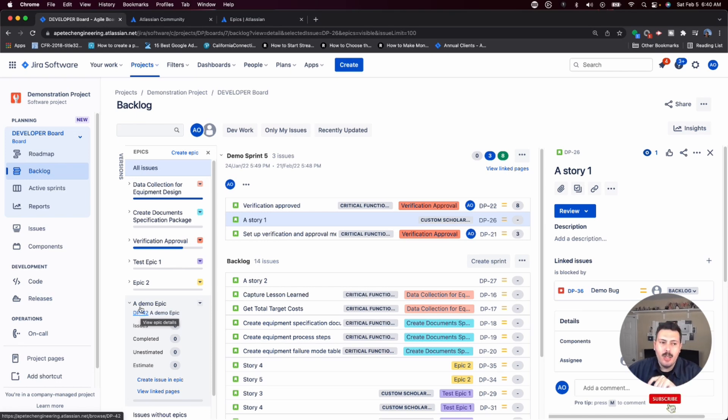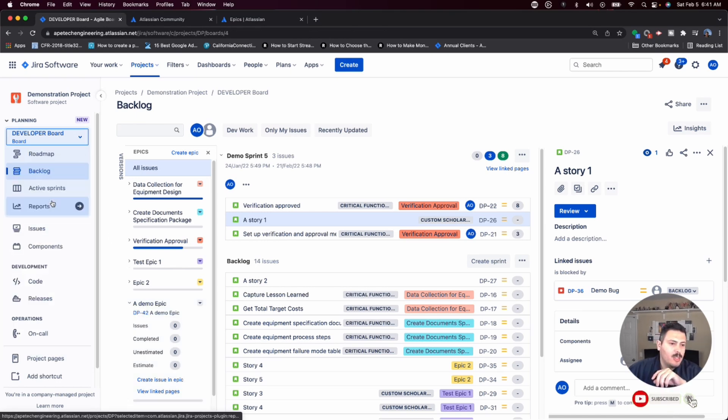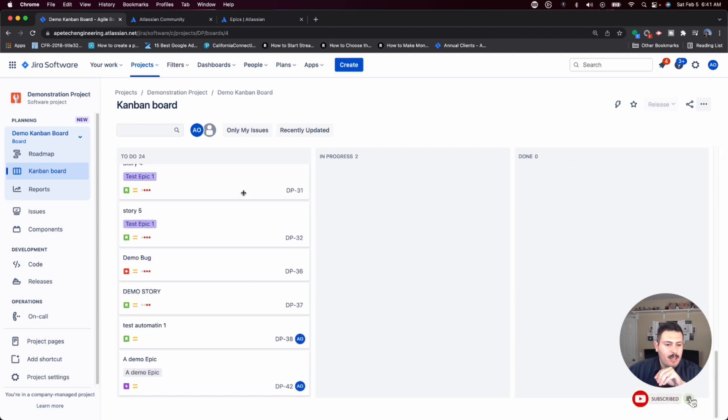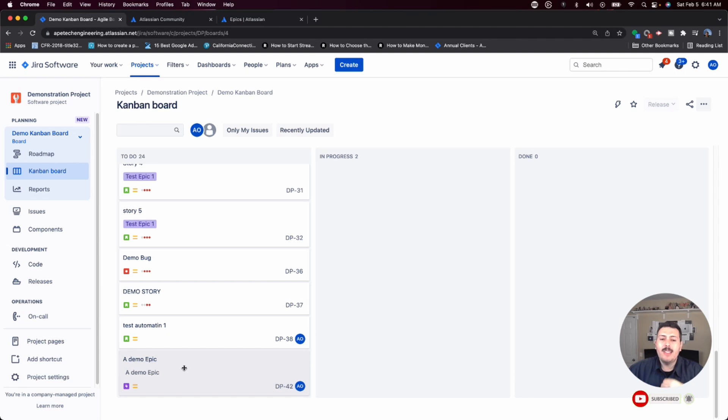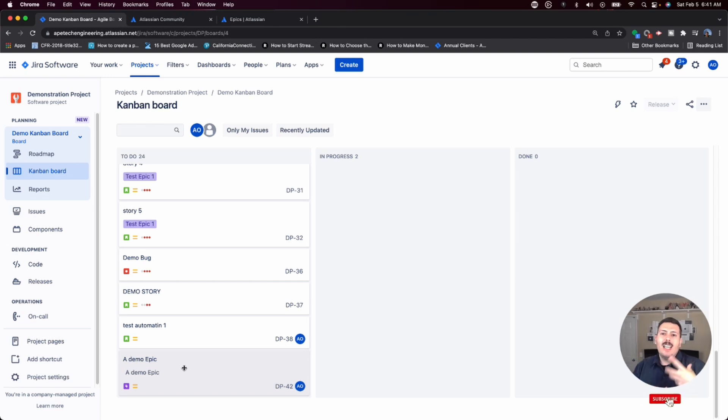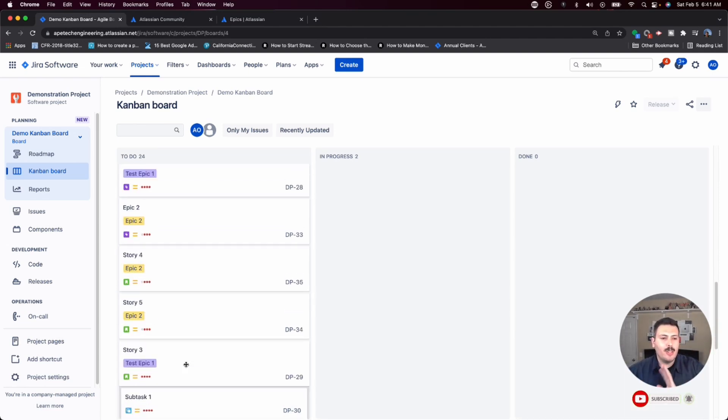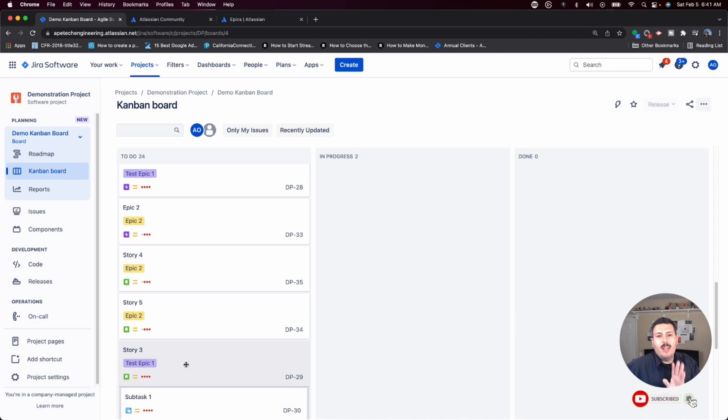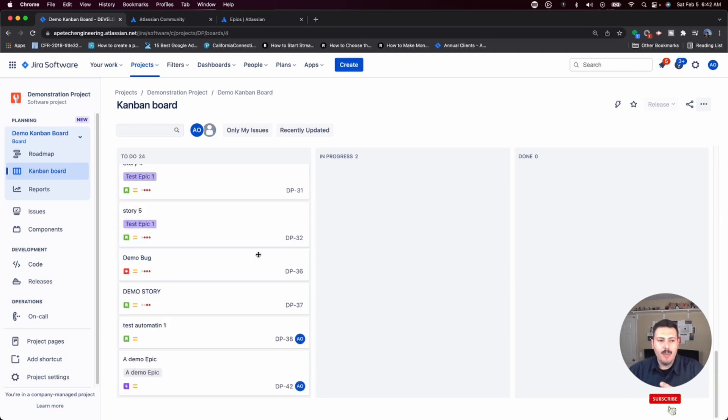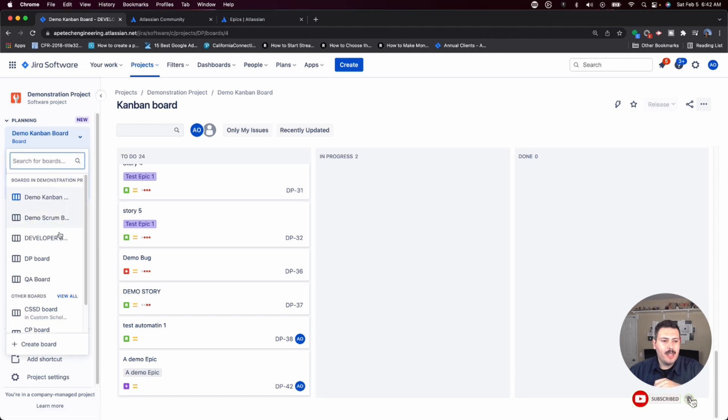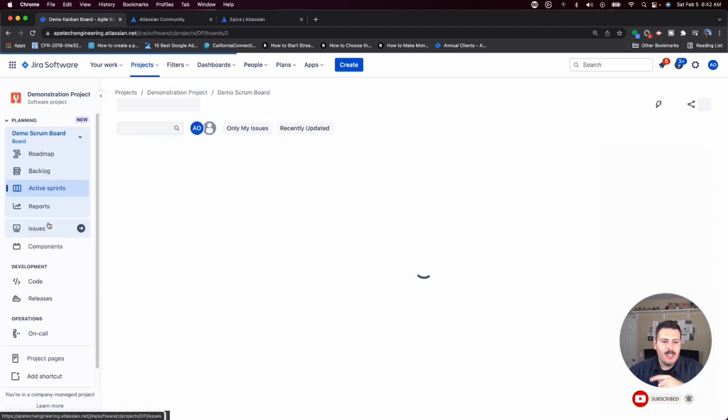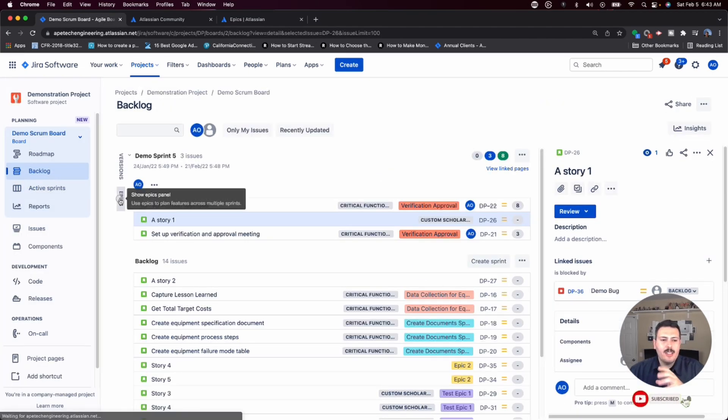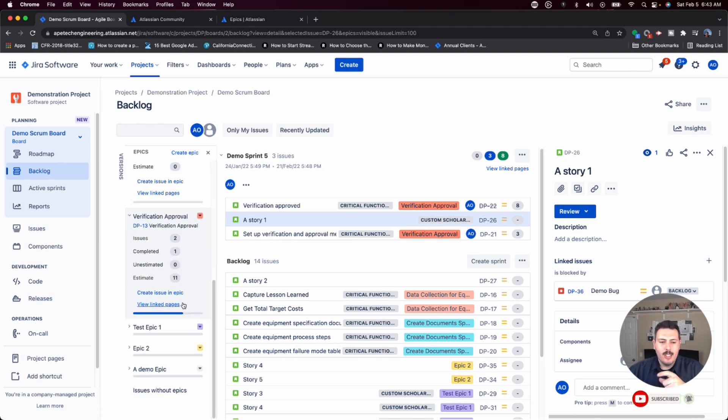Now, if you're in a Kanban board, let me show you a demo Kanban board. This filter for this board should be such that my epic should show up. Yep. You'll notice that my epic shows up. And that's because out of the box, a Kanban board is going to just show you all the issue types because in Kanban, there really isn't that sense of organization that is so key and critical to a scrum method success. Kanban is going to treat every issue, whether it's an epic, story, subtask, whatever you throw at it, it's going to treat it as an equal. And it's just going to display it to you unless you make some configurations. Okay. So now that you've seen how the epics are treated in the Kanban board, let's switch back to the scrum board because most teams are going to be using the scrum board anyways.